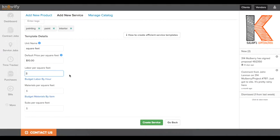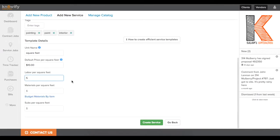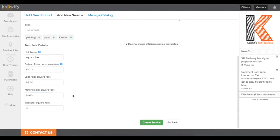So what it's asking me for here is the dollar value that we budget for labor for every square foot of interior painting. So if every square foot costs me $5 in labor and I have to spend $1 in materials, that's the value we're going to be using when we're putting in the budget of our job later on.